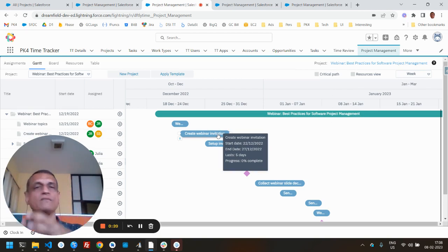And therefore, you could do some very interesting reporting and actually track your project as it executes. So you're not just, finger in the eye, talking about how much progress your project has made. You can actually say, for this project, I set aside 200 hours, and now we've actually spent 120 hours. I think we're 60% done.